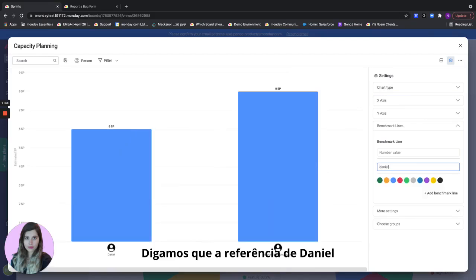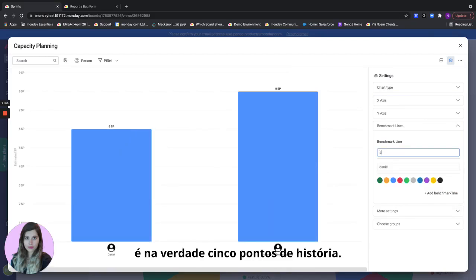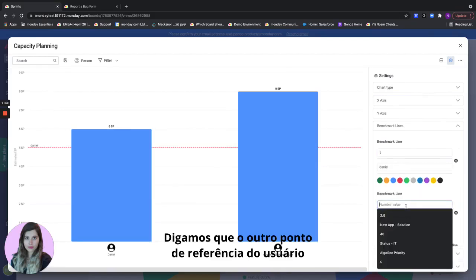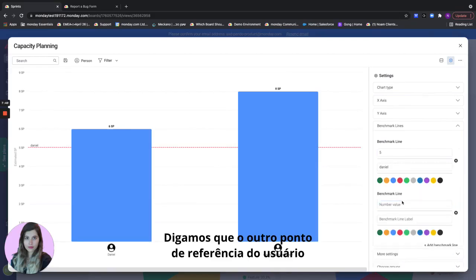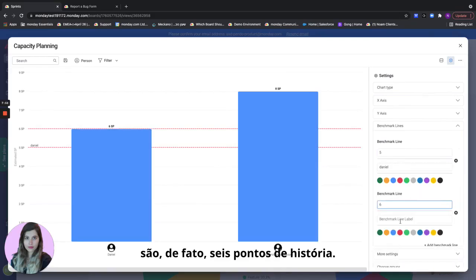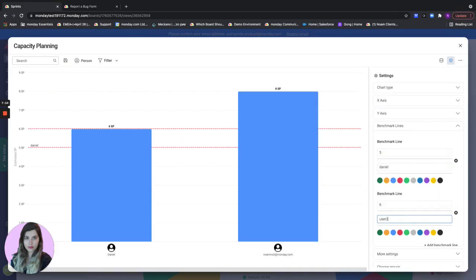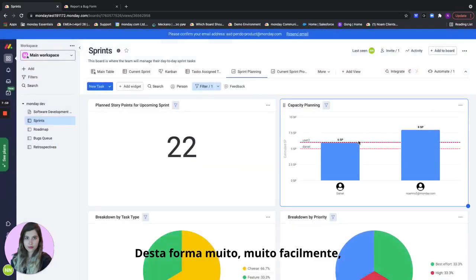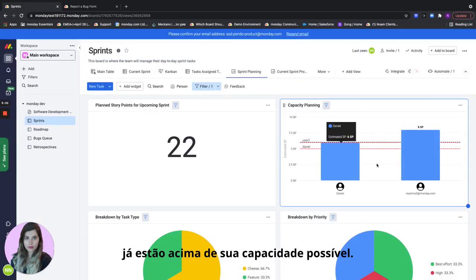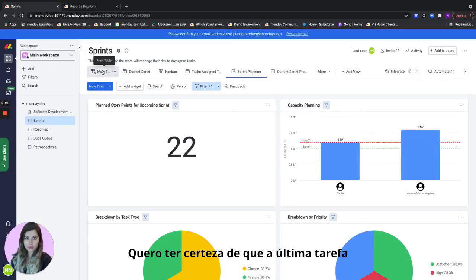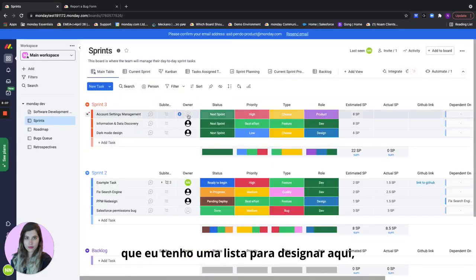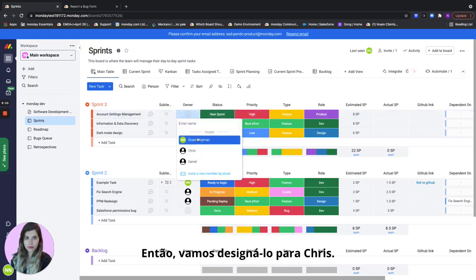So let's say that Daniel's benchmark is actually five story points and let's say that the other user benchmark is actually six story points. And this way very easily I can see that both Daniel and user two are already above their possible capacity. So I want to make sure that the last task I have left to assign here I'm going to assign to some other team member. So let's assign it to Chris.